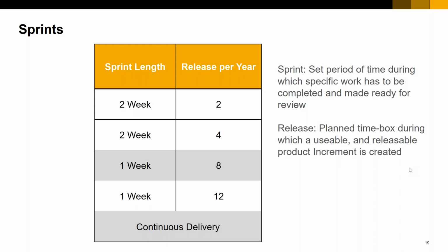These are the early phases of the product, and in some of the early phases where the product is not that complex in nature, it can have 4 releases per year, which is basically a release every quarter. This is also typically a 2-week sprint length that we follow, right? Then when the product starts getting matured, there are even 8 releases per year, even 12 releases per year, which is a release every month. Some of the teams are even trying to go into weekly release. That is something they are trying to achieve in a B2B environment. This is from our organization's perspective, right?